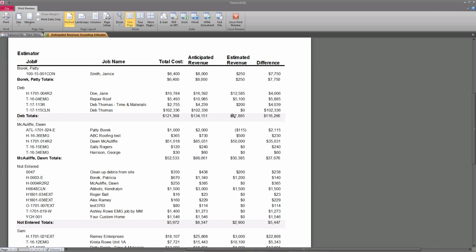If you don't maintain the estimated revenue, the percentage, if you don't make sure the job costs are posted correctly to the jobs, you cannot run a good WIP process. Very important to always check your balances of your WIP. Always very important to use the reports to make sure the inputs on the job are correct. Make sure accounting is posting their information regular. Don't let accounts payable post once a month.